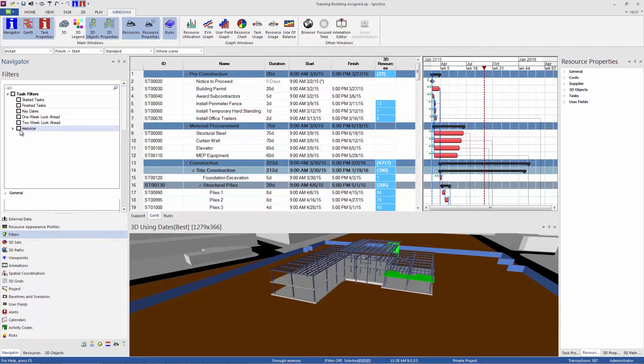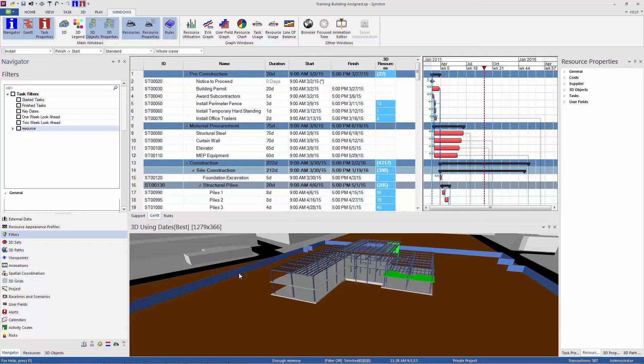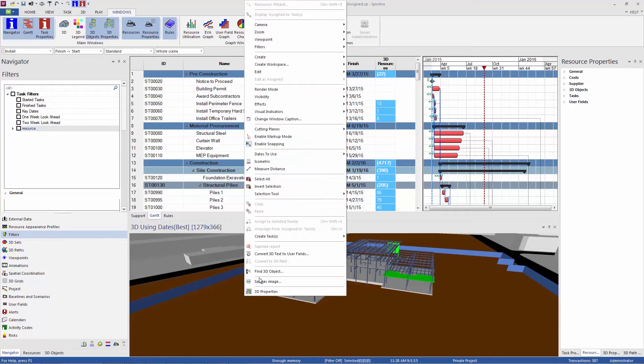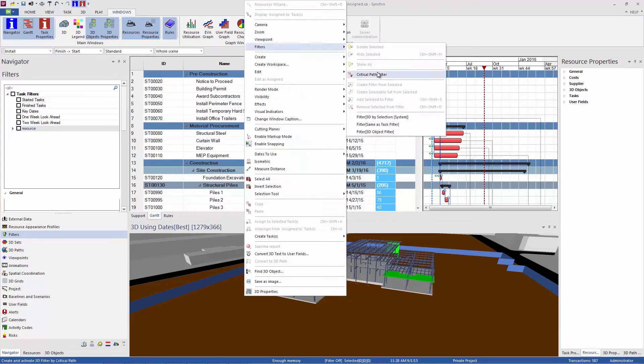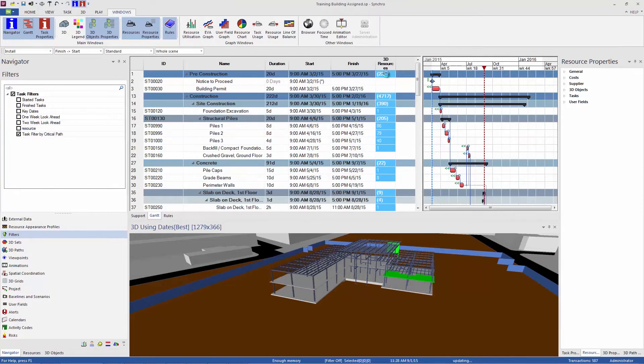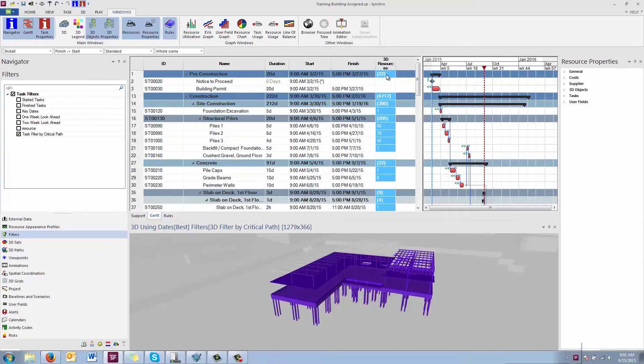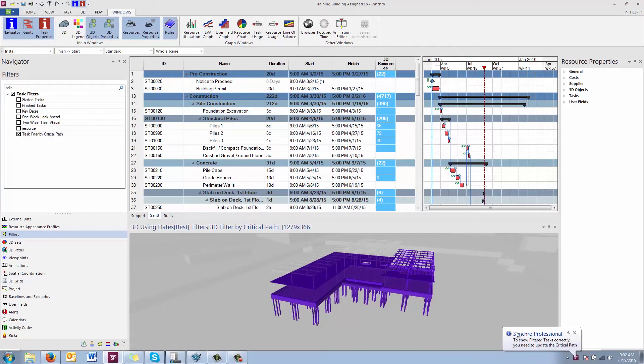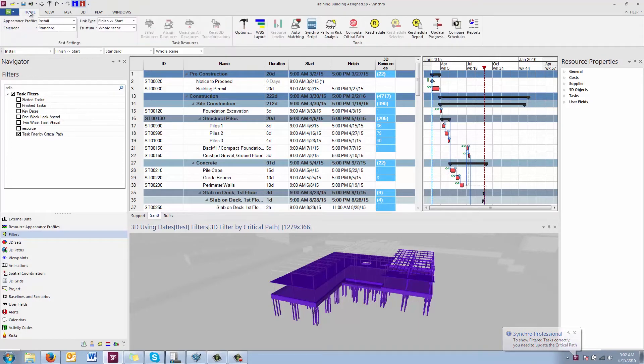Another filter that is a combination, actually, of a task filter and a 3D filter is a critical path filter. And this one is built in. It just acts just a slightly different way. So to get to the critical path filter, you right click in your 3D window and go to filters and turn on critical path filter. So what this has done, you'll see here, you'll see this pop-up notification at the bottom reminding us that we need to calculate our critical path and make sure it's up to date. So the first thing to do that is just go to the home ribbon and choose compute critical path.